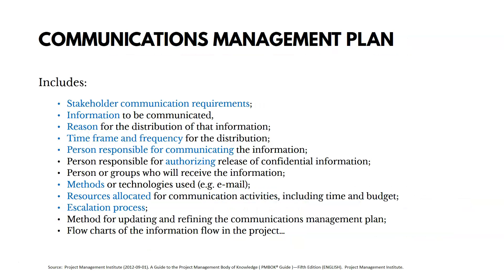The key output of planning communications management is the communications management plan. A lot of it is common sense — it includes the actual requirements of the stakeholders: what are we supposed to communicate to them, what information do they need, why do they need to know it, when are we going to communicate it, who's going to communicate it, how are we going to communicate it, and so on.